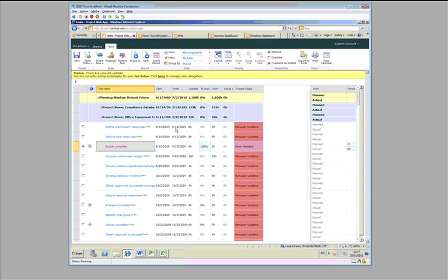Or I could go to more level of detail and say, okay, I've completed 8 hours here, but actually, do you know what? There's another 4 hours still to do on this, and I may have completed that much, for example, or change the end date and say, we planned to end then, but actually we're going to end somewhere else. And again, I could select that, and send that via an authorization process back to the project manager in the plan.